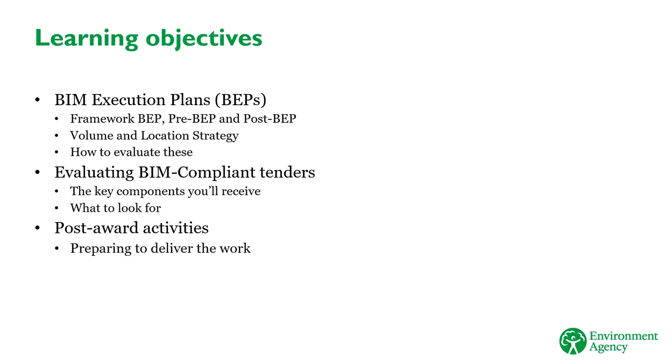Finally, you learned how to prepare the information delivery plan and common data environment so that they're ready for work to be delivered once the contract is awarded. In particular, the necessity to update the IDP before awarding the contract so that it reflects what's been agreed with the supplier from the marked up IDP.